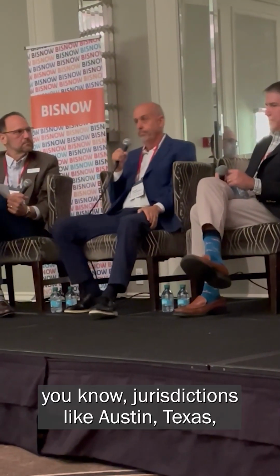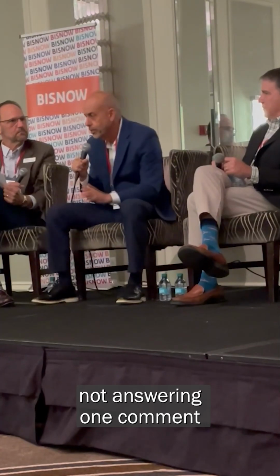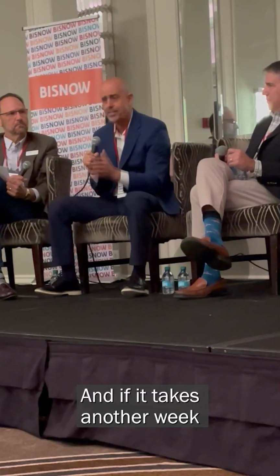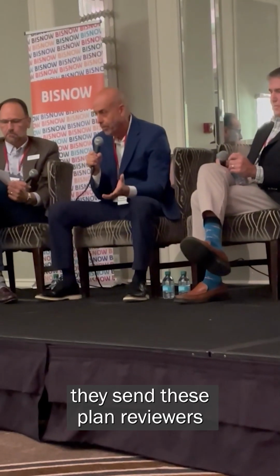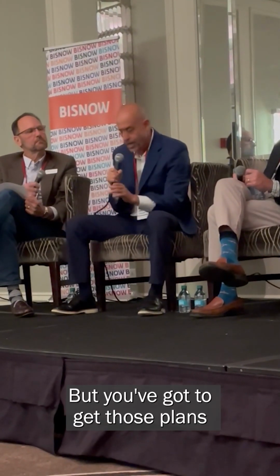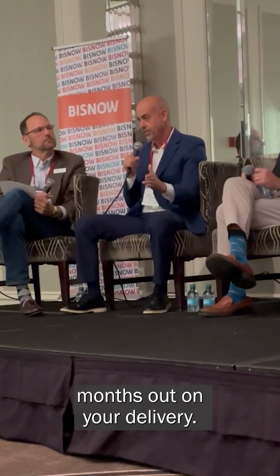And if you're talking about jurisdictions like Austin, Texas, or the city of Sacramento, think about this: not answering one comment can push your project back 2 months. So you've got to stop and take the time. If it takes another week to really look through, they send these plan reviewers to all these different conferences. It seems like, all of a sudden, coast to coast, we get a wave of new comments that we haven't seen before. But you've got to get those plans tight, and you've got to answer the comments. That can cut months out of your delivery.